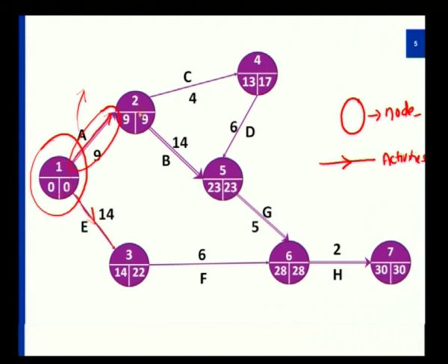After the completion of A, in the previous table I have indicated B and C are the two parallel activities which I am able to continue. So B and C are done in parallel. Now forget about these double lines also. It is going to be a single line and an arrow mark which will represent the activity. So B and C can be done in parallel. After completion of C, I can start with D.